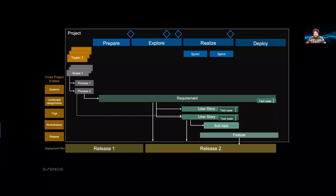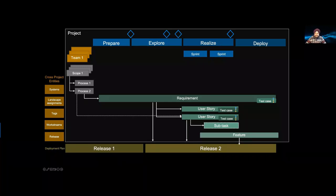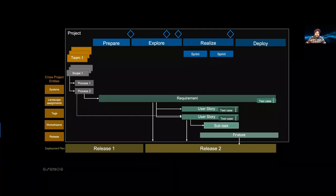Test cases can be assigned to requirements and user stories, and defects exist in context of a requirement. We have defect traceability and test execution reporting to tell you exactly where you are in the project. Features are the deployment vehicle that takes functionality to production — the simplest use case is a bug fix where you create a feature and send it to production, while a more elaborate case involves multiple user stories combined into a feature to avoid sequence issues before sending to production.